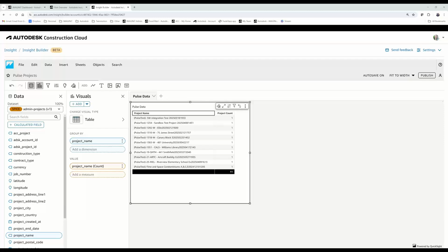When you get into cost management, it makes it extremely difficult to manage budgets, financials, and change orders. Not that it can't be done, it definitely can be done, but it opens up a lot more room for user error. Picking the right contract, picking the right building code every time you're trying to apply a new budget or a new change order to one of three contracts in the project. Those types of things can be time consuming and difficult to wrap your head around. And honestly, the environment just generally works better on a one building to one project when you're doing heavy management within those.